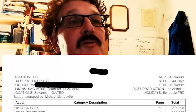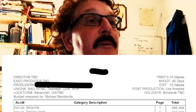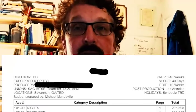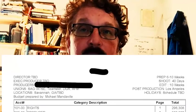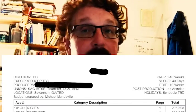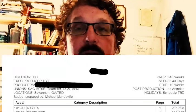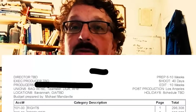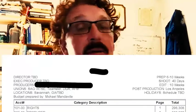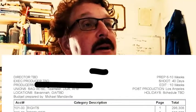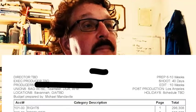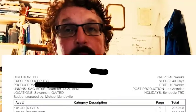It also tells us how many weeks we're editing, shooting, prepping, and the location. In this case, Savannah, Georgia, because Georgia, unlike California, offers some pretty good incentives in terms of above and below the line and for independent film. It tells you who prepared the budget.